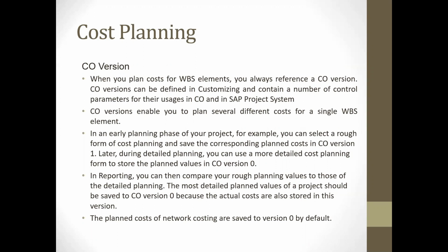Let's say you are planning your project with the baseline planning. You want to save the values somewhere else. In that case, you will save the values to another version, which is version one. After baselining, there will be the detailed planning. Whenever we perform detailed planning, we can compare what is my base plan and what is my current plan.